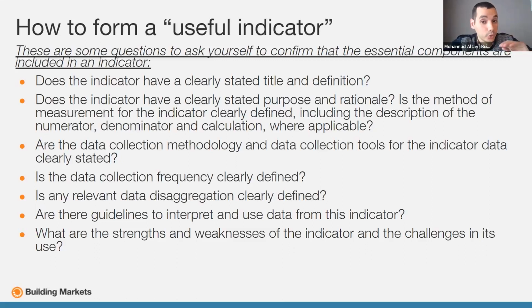Yes, it is important to know what data points you need and how you want to disaggregate them. Because when you build out your data collection tools, you will have all of this incorporated. If you know that you need your data disaggregated by gender, it is important to have a gender question in your data collection tools, in your surveys, in everything else that you will design later.